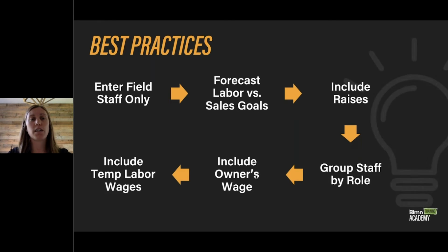And last but not least, if you do use temporary labor or you're using an outsourced company for temporary labor, we will want to include those individuals who we hire for the season through our temporary labor agencies in our field labor budget. We don't want to enter those in our subcontractor budget. They want to go in our field labor budget.